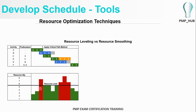If you take the resource limit — the constraint that the project should not exceed five persons at any given point — there are periods where three and four man-months overlap, meaning seven resources are used. At other points, six, eight, and six resources are used, all exceeding the limit.